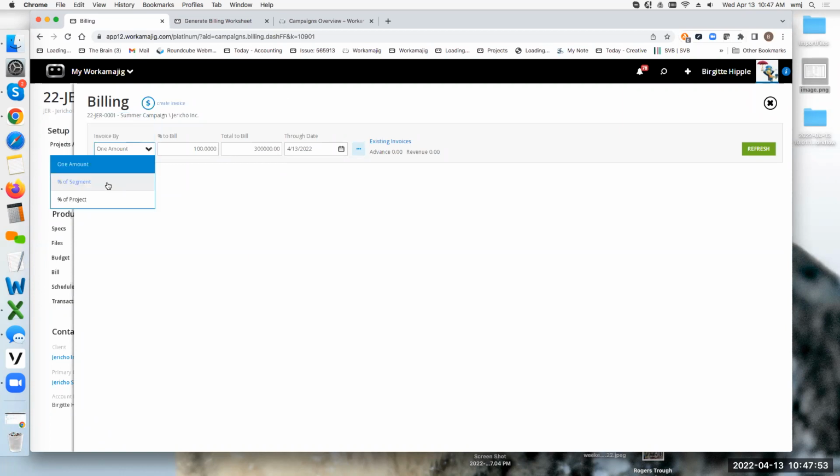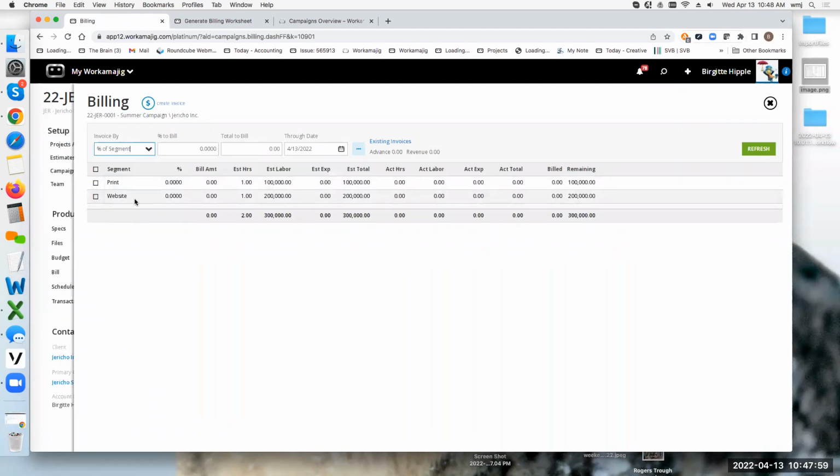I can come in and say, well, I'd really like to bill it more based on the segments that I have set up. So I've got print and website, and I can bill based on a percentage of that and say, well, I just want to bill 50% of each of those segments now.